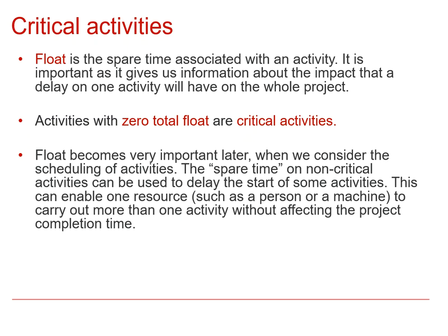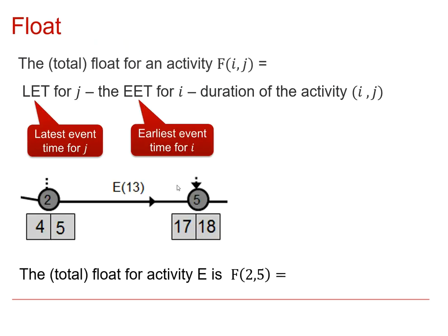We'll find that float becomes very important later when we're dealing with scheduling of activities, because it gives us some freedom as to when activities start and end. So if we're in a situation with limited resources, we can make sure that a resource that is limited is not having to be overused at any one time by moving the start and end times of certain activities so that they don't overlap.